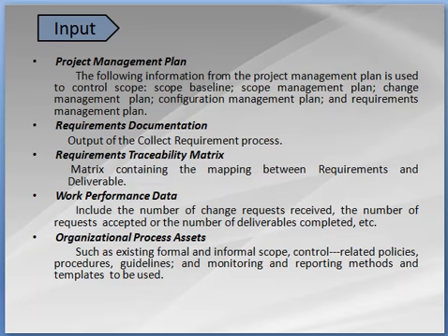The detailed look at the inputs: the project management plan. The following information from the project management plan is used to control scope: scope baseline, scope management plan, change management plan, configuration management plan, and the requirements management plan. Requirements documentation, the output of the collect requirements process. Requirements traceability matrix, which is the matrix containing the mapping between requirements and the deliverables.